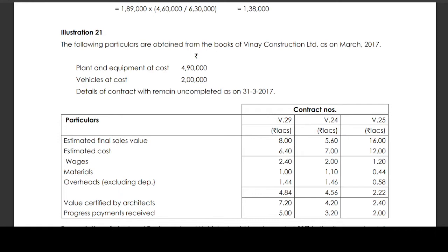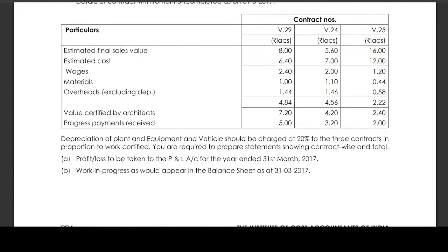For contract V25: Estimated final sales value is Rs 6,00,000. Estimated cost comprises wages Rs 1,12,000, materials Rs 44,000, overheads excluding depreciation Rs 58,000, totalling Rs 2,22,000. Value certified by the architect is Rs 2,40,000. Progress payments received is Rs 2,00,000.